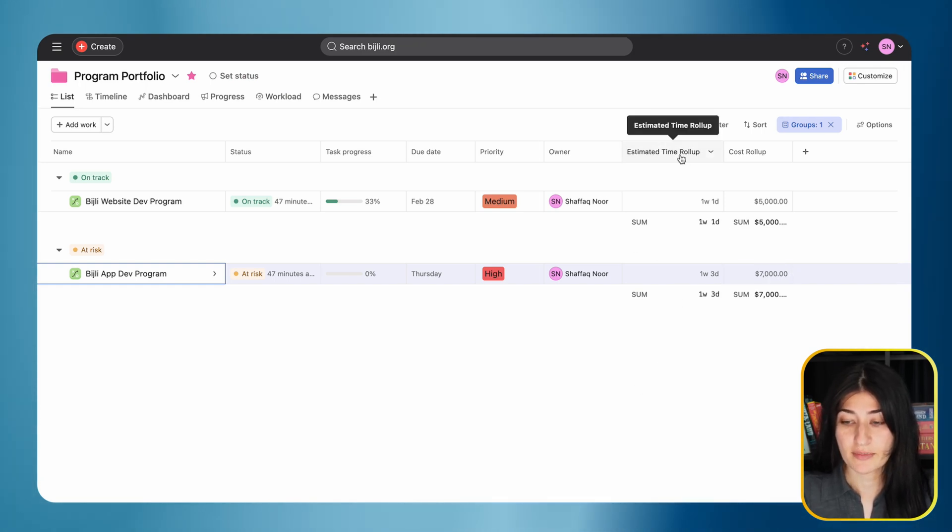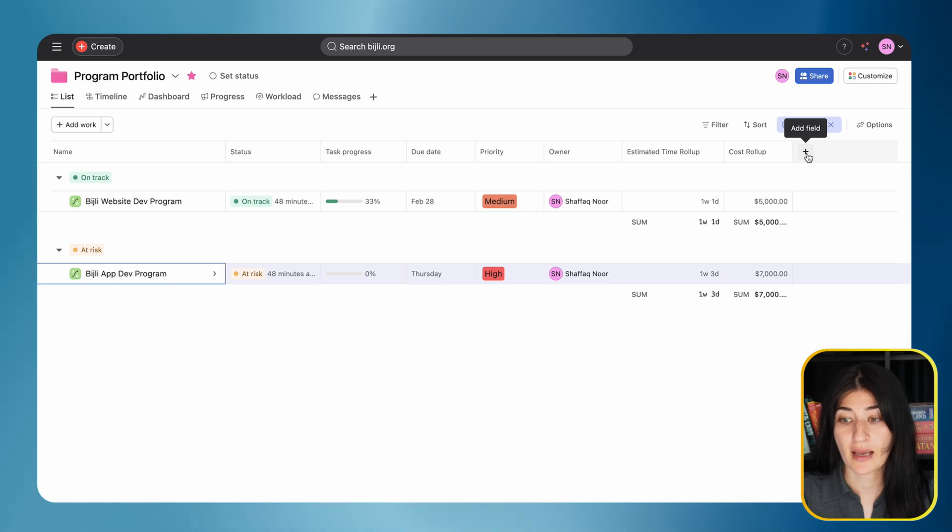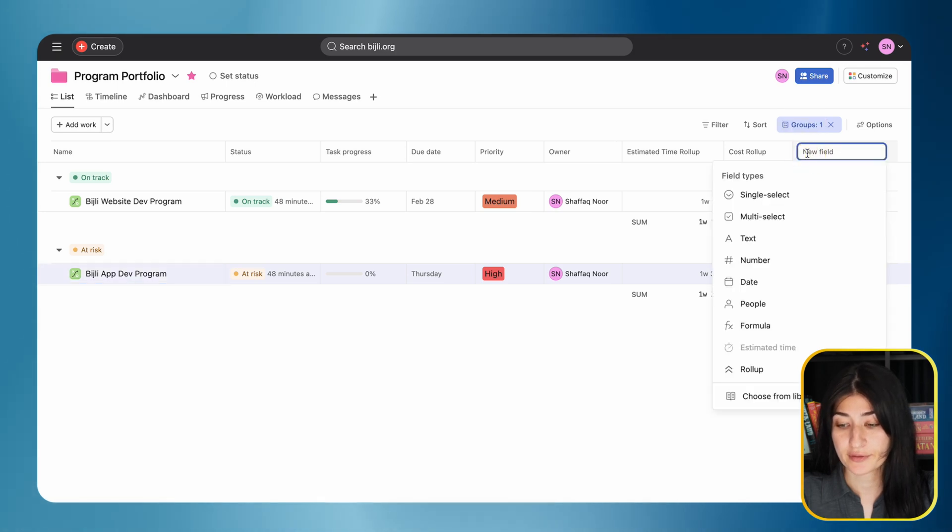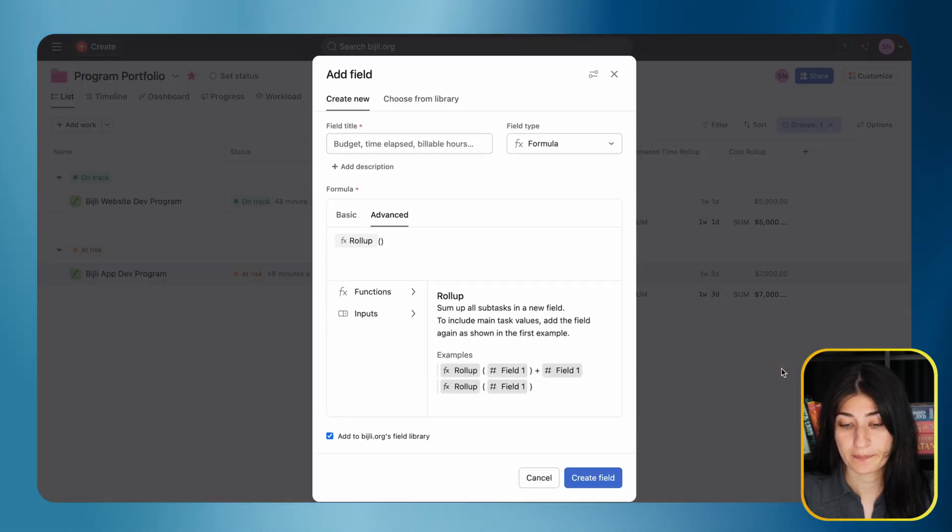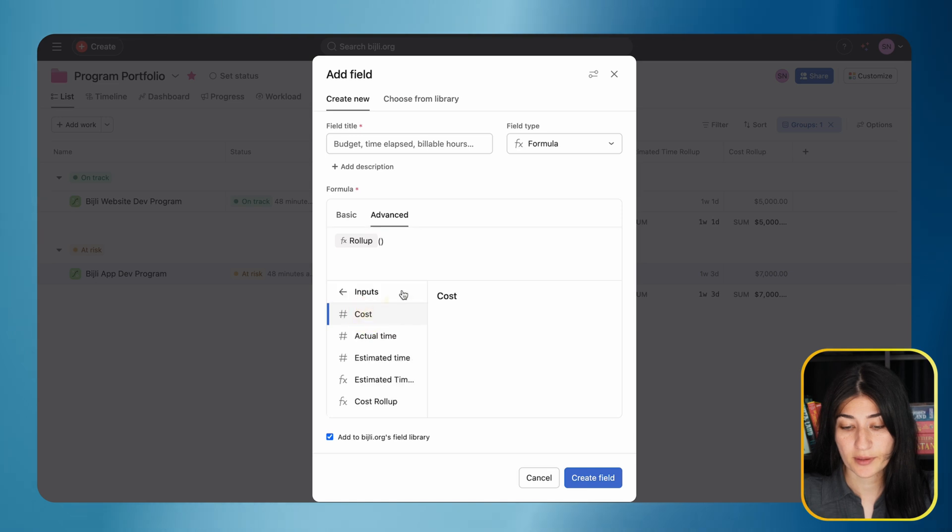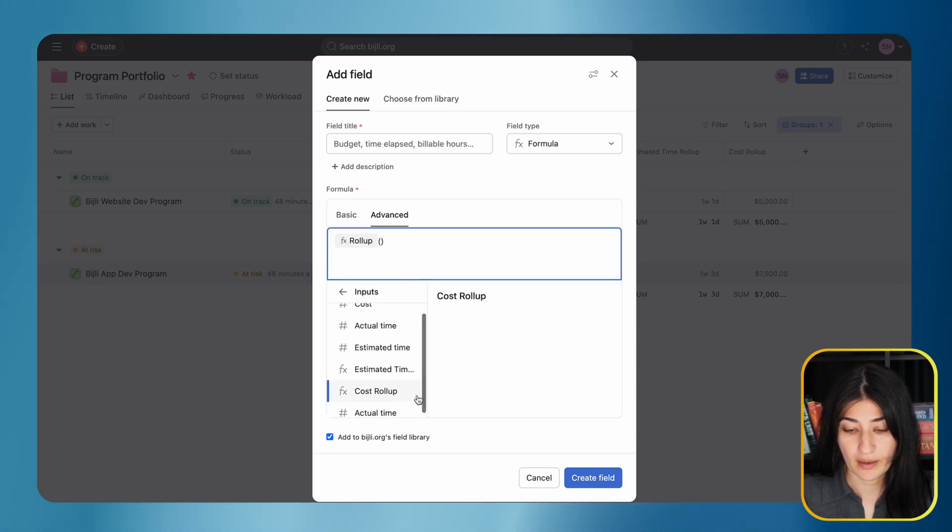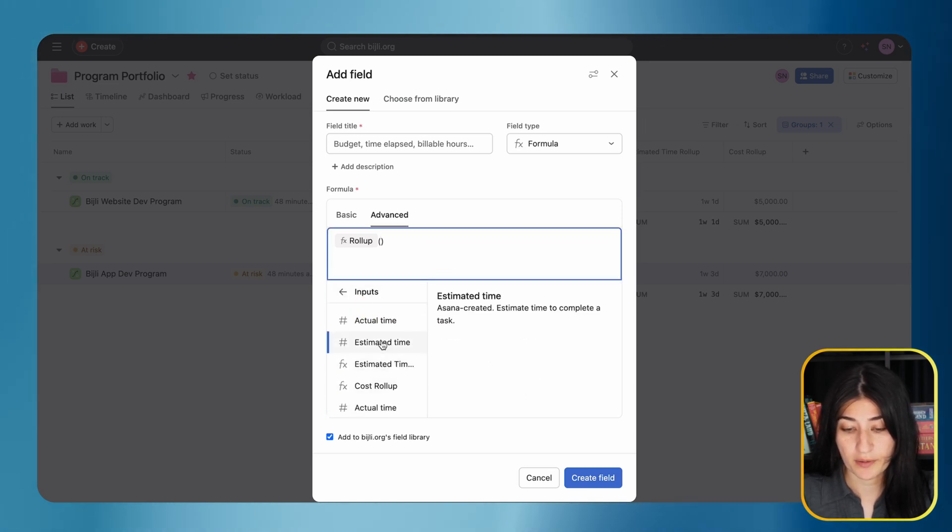Considering I have my estimated time roll-up, let's create an actual time roll-up to see how I'm tracking to the time I estimated. I'm going to do the same thing - add field, select roll-up, and put in the actual time as the input.